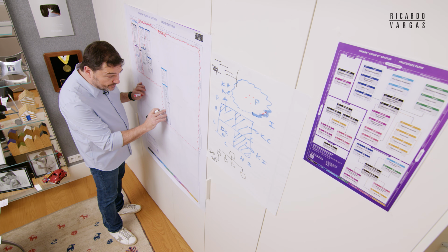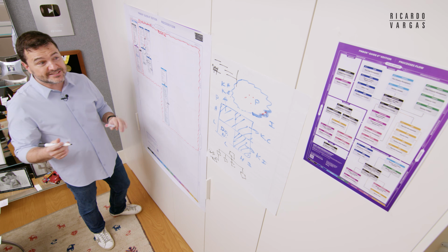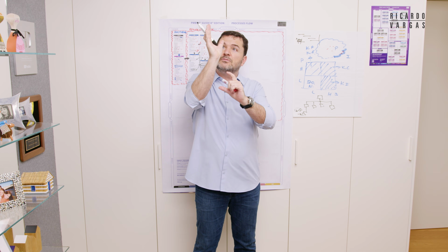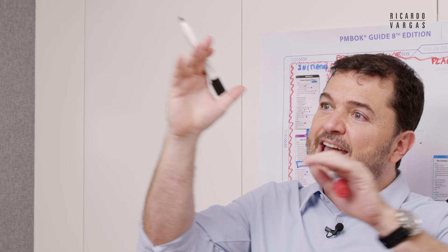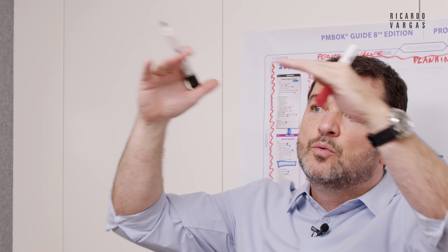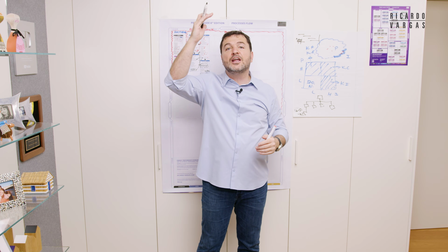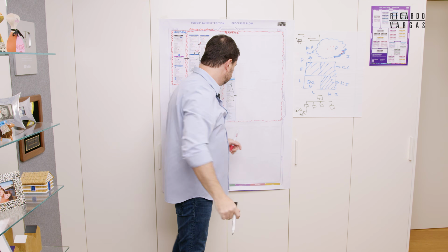Resource optimization, for example, resource leveling. For example, if you are using more resources today, what do you do? You delay and you do a leveling, resource leveling, to make sure that you do not over-allocate any resource.